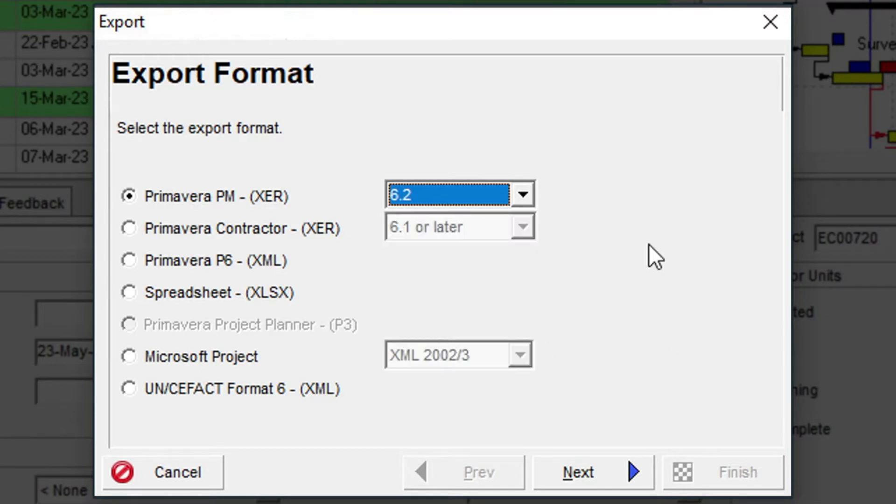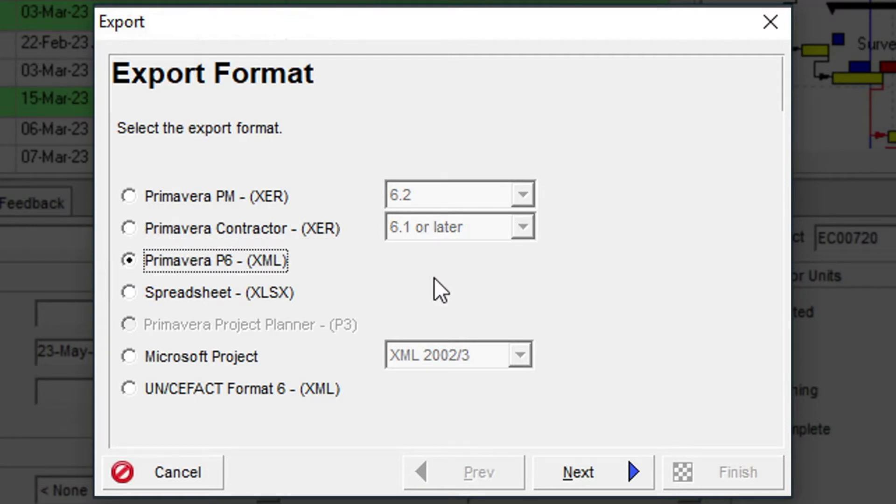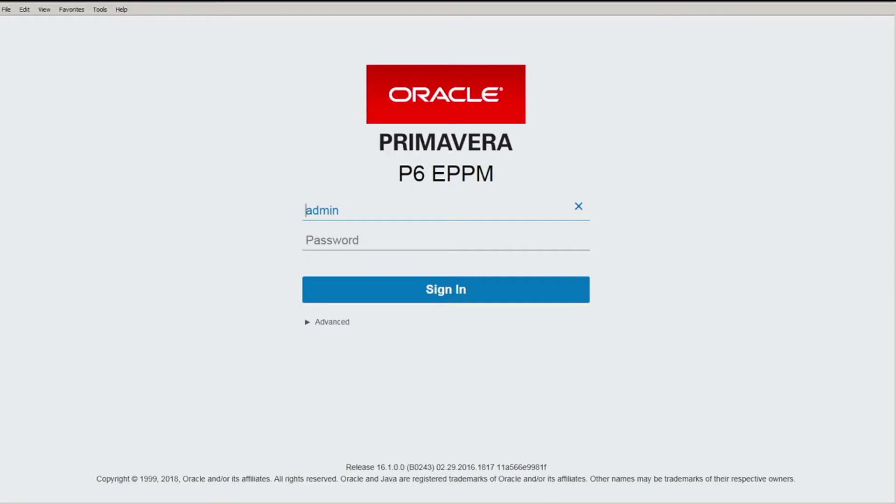Other export options are Primavera Contractor, Primavera P6 XML—this is a more recent format developed by Primavera and is required if you are exporting your project to the web-based version of the system known as Enterprise Portfolio Project Management, or EPPM.